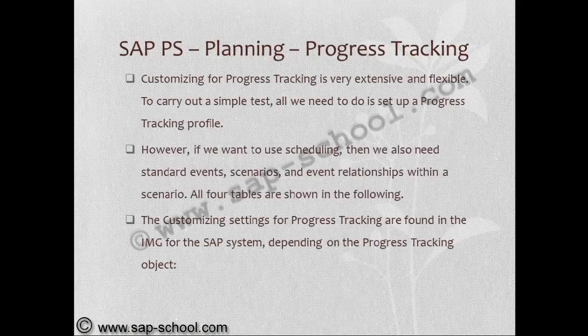Customizing for progress tracking is very extensive and flexible. To carry out a simple test, all we need to do is set up a progress tracking profile. However, if we want to use scheduling, then we also need standard events, scenarios, and event relationships with a scenario. All four tables are shown in the following.